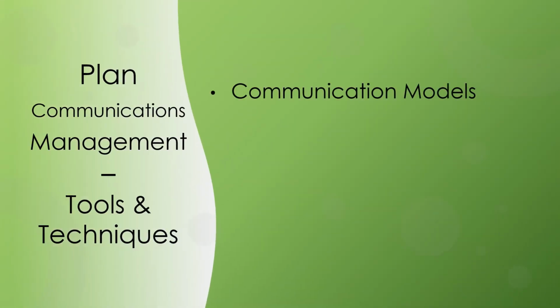Communication models. Communication models can represent the communication process in its most basic linear form, that is sender and receiver, in a more interactive form that encompasses the additional element of feedback, that is sender, receiver, and feedback, or in a more complex model that incorporates the human elements of the senders or receivers and attempts to show the complexity of any communication that involves people.